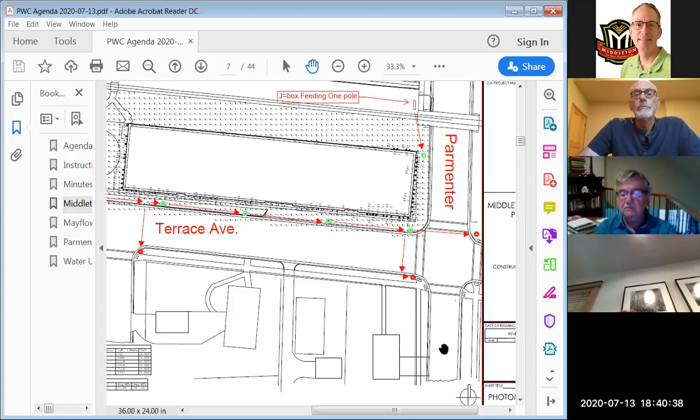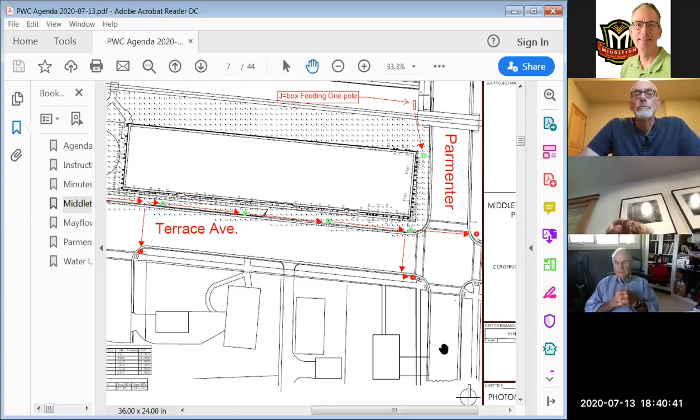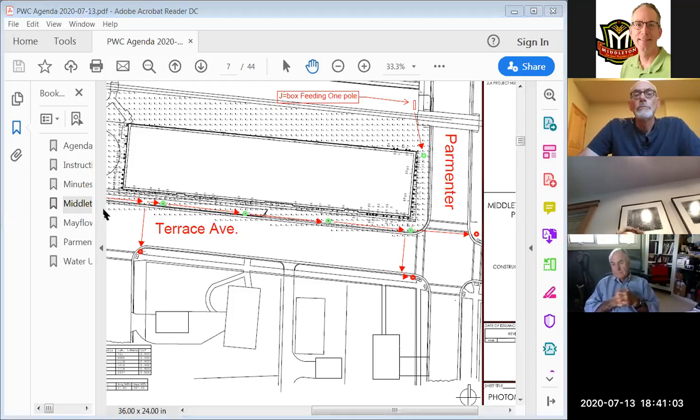If I can jump in here, I think we can most definitely try the junction boxes on top of the poles. That's not a problem. We will be reworking some of those as far as grade goes, so there may be temporary outages in that intersection. I would say maybe a couple days at a time, though more likely just a day off, and then we would have them back up by the night. Second option would be an exposed conduit, some type of PVC along the curb.